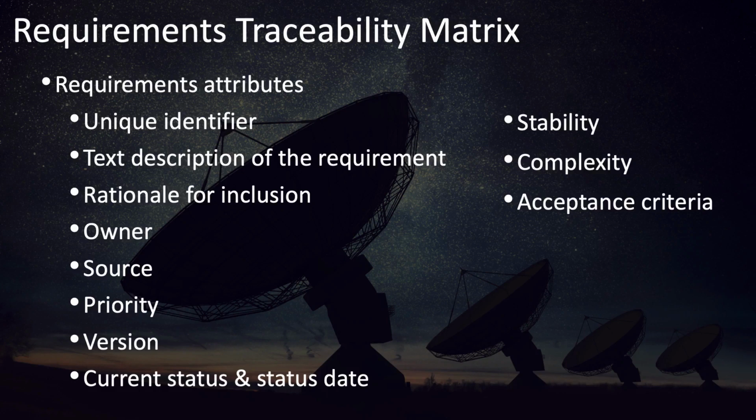Of course, there should be a short description of the requirement. There should be a reason or rationale for why this requirement is included in this list of requirements. Each requirement should have an owner. Who's responsible for this requirement? You should also record the source, who first came up with the idea of this requirement or who has this requirement as a need.